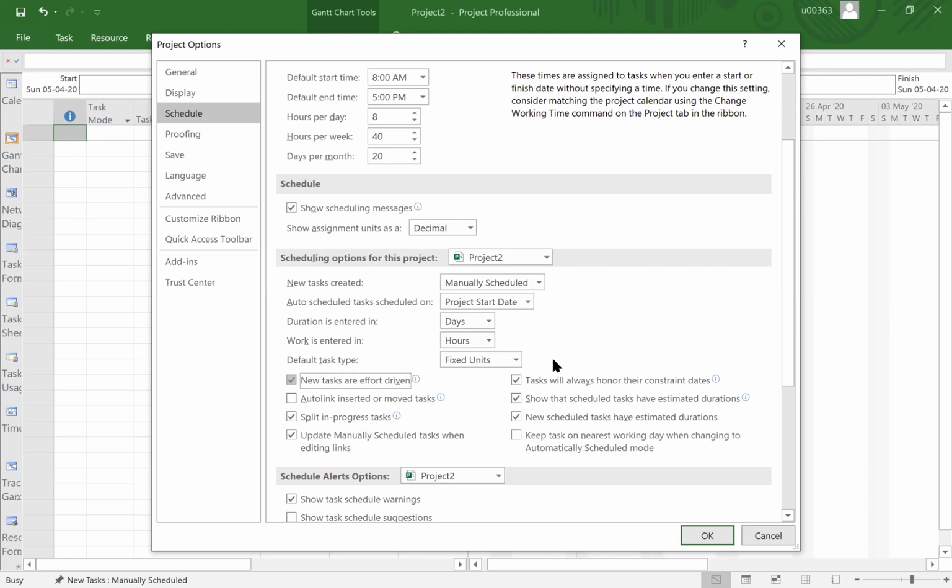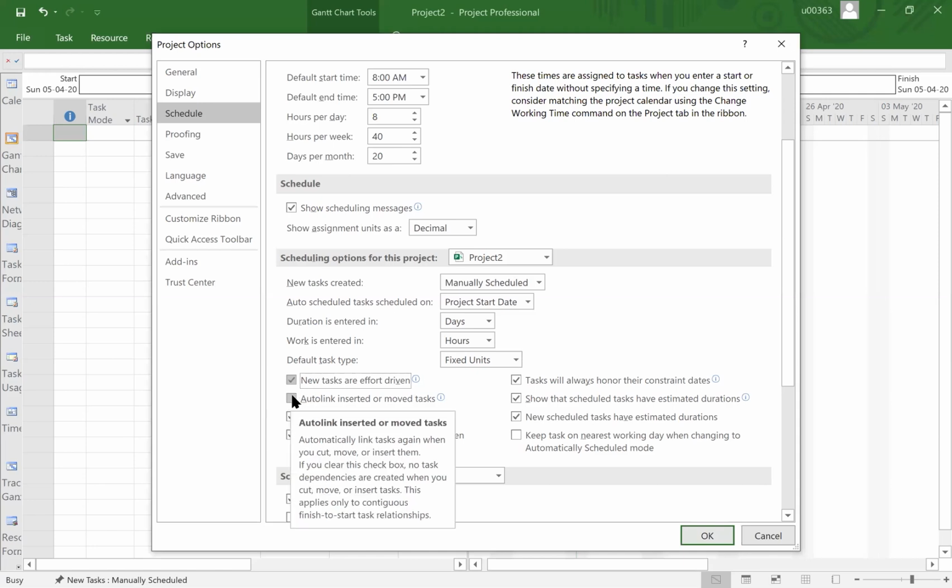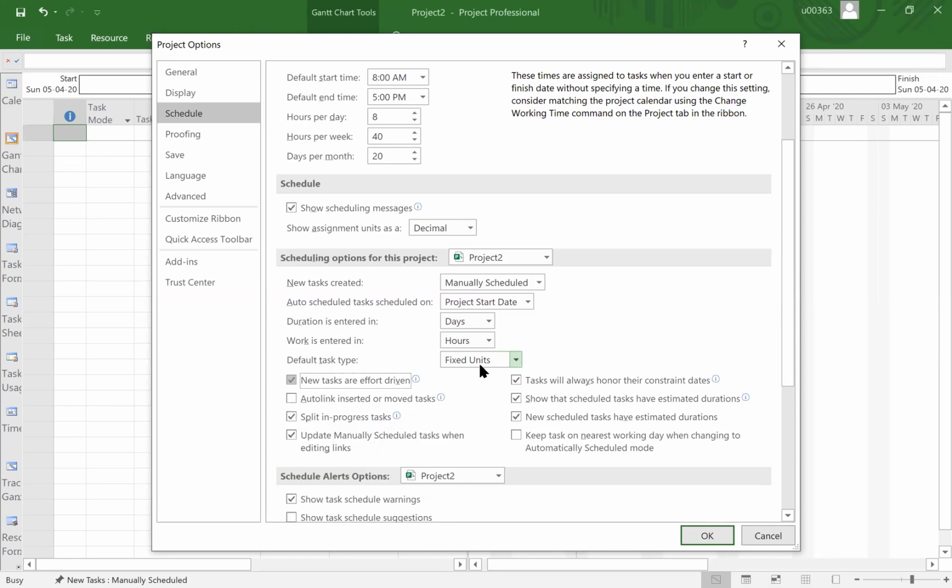For sure, let's say you fix one tower crane, and for one particular activity, it will require 10 days. Let's say suddenly you bring in another tower crane. For sure, your duration of the activity will be reduced to 5. So the computer or Microsoft Project will automatically do that. This is what this function is all about. So you might want to tick this one with fixed unit. But if you choose fixed duration, please untick this button. That is the proper way of doing things.